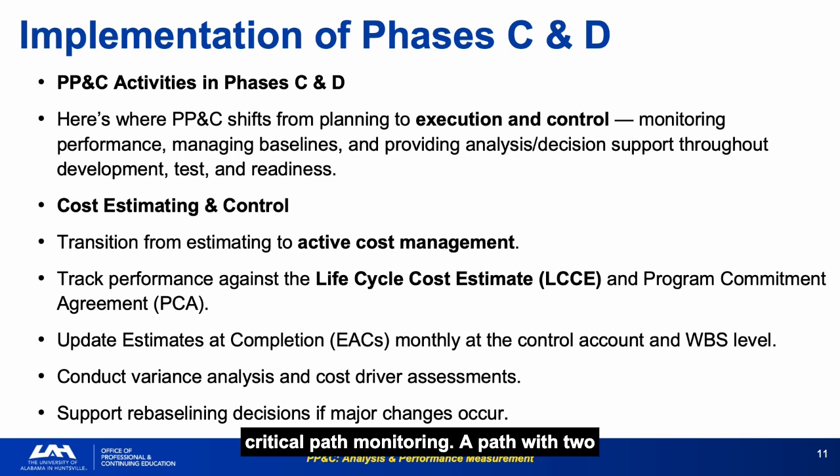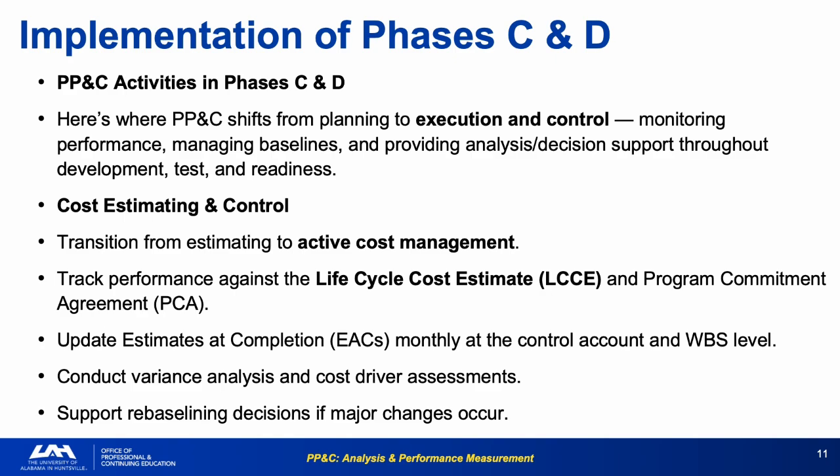A path with 2 weeks of flow today can become critical tomorrow if one task slips. Look-ahead reports and early warning metrics are the outputs that give management time to act before problems become crises.